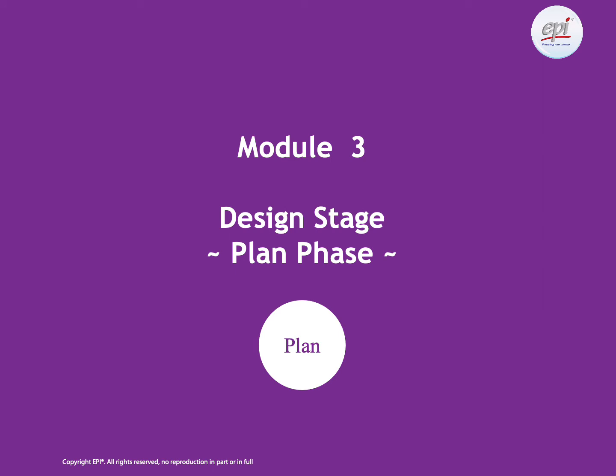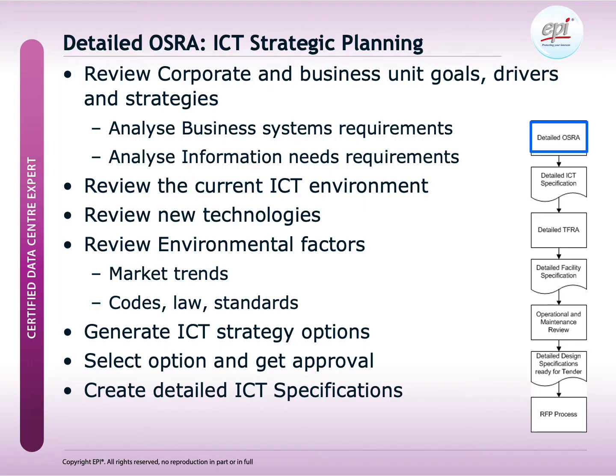After the prepare phase comes the plan phase, where we create the detailed ICT and facilities requirements. Once finalized, we can freeze the design specifications and do the vendor selection.